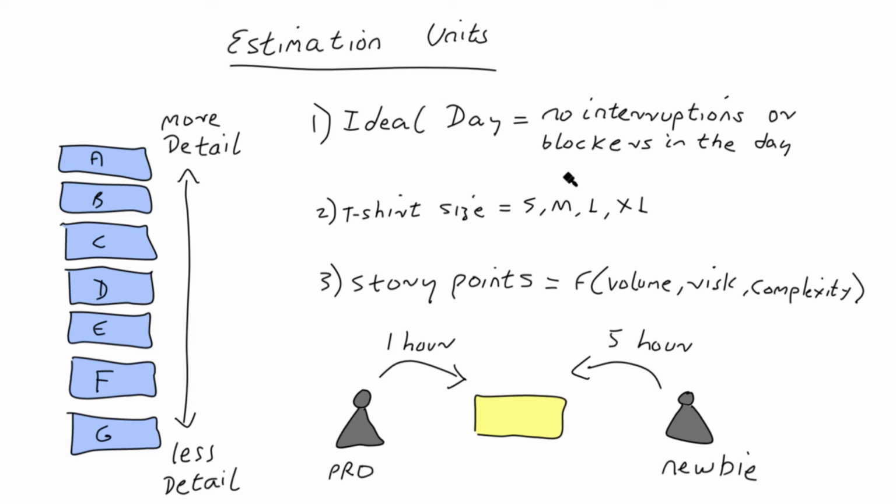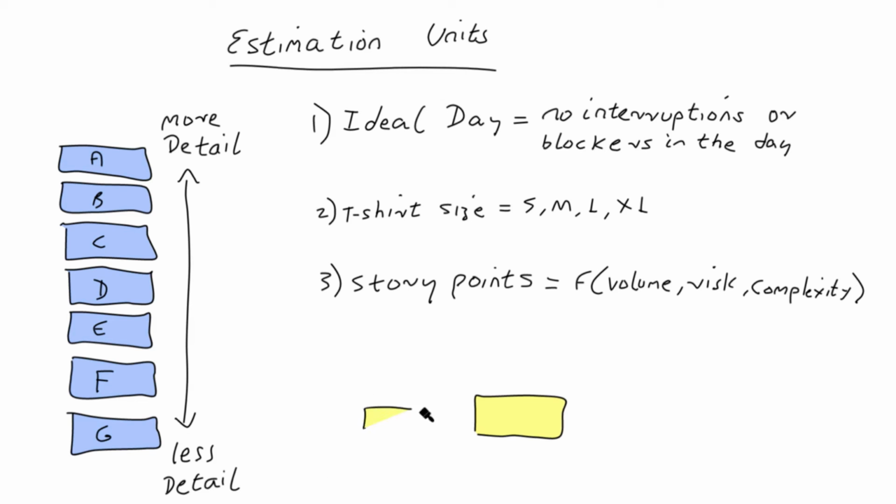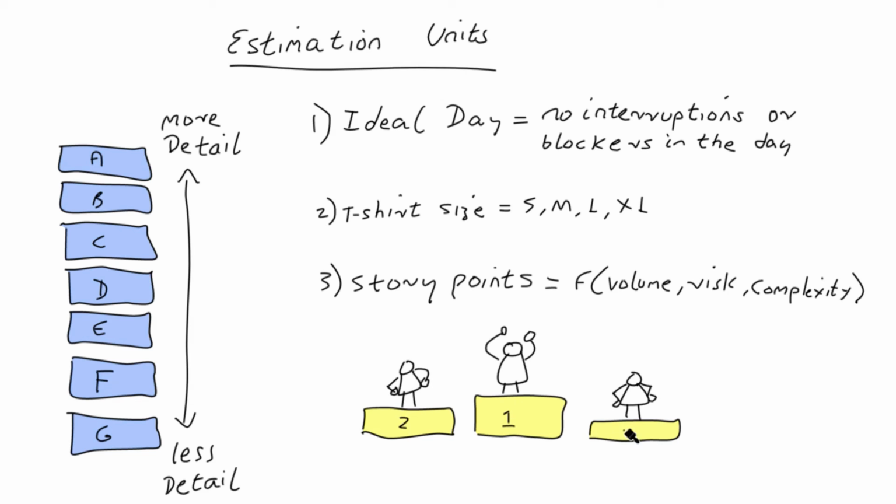Now, the second reason for using story points is that it prevents teams from comparing performance and creating what is often an unhealthy competitive culture. Once teams start comparing their velocity, then this can result in teams engaging in undesirable behaviors, such as overestimating stories to get ahead of other teams. With story points, velocity between teams becomes harder to measure and encourages a healthier culture.